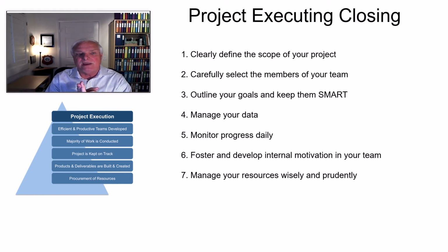Manage your data. Understand it. Understand where your critical path is. Look at your schedules. What can we do every day to gain one step forward that we didn't think about? Monitor that progress daily. You have to, at certain times, monitor it twice a day. I've seen stand-up meetings we would have at 7 in the morning and another one at 1 in the afternoon because we were working on multiple teams that are working 24 hours a day. So remember, sometimes waiting a day for somebody to tell you what needs to be done when it could happen sooner is not a good thing. Find a way to work that.